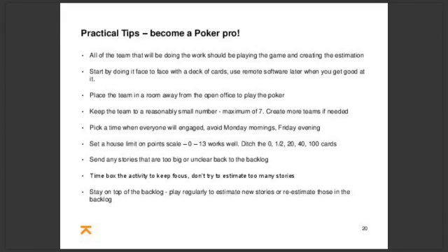So, what I thought I would do is give you some practical tips. I've been using this as a technique with the teams I've been managing. I thought I'd just pass that on and you could hopefully pick up some bits yourselves. So, all the team that will be doing the work should be playing the game and creating the estimation. It's better to start doing it face to face with a deck of cards. There is remote software available in the market, and you can use that later on when you get good, but I would suggest getting people familiar with the process face to face is a good thing.